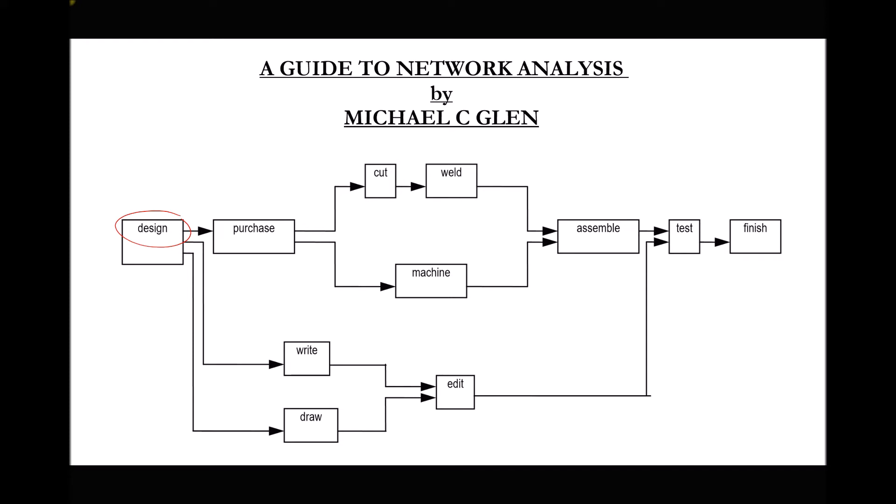Once those two components are produced, they need to be assembled and tested before we can finish manufacturing. Looking at the top line, two activities can run concurrently: the cutting and welding of one component and the machining of another. These two processes can be carried out in different areas of a factory by different people — one doesn't need to be completed before the other starts. However, we do need to purchase the materials before either fabrication or machining can begin. Some tasks are dependent on others, while other tasks can run concurrently.